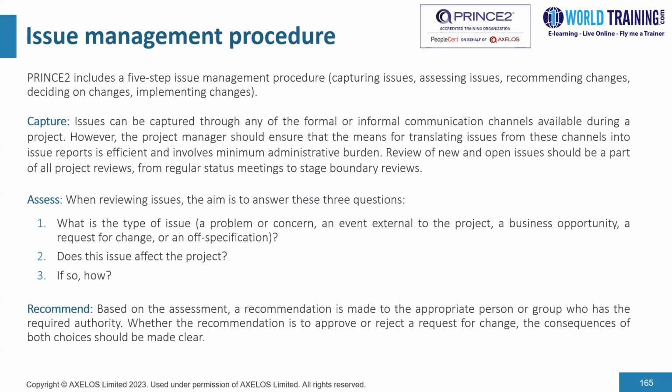However, the PM should ensure that the means for translating issues from these channels into issue reports is efficient and involves minimum administrative burden. A review of new and open issues should be part of all project reviews, from regular status meetings to stage boundary reviews.